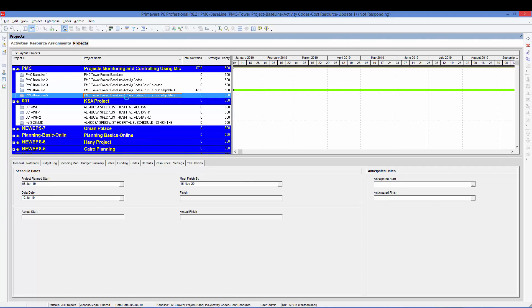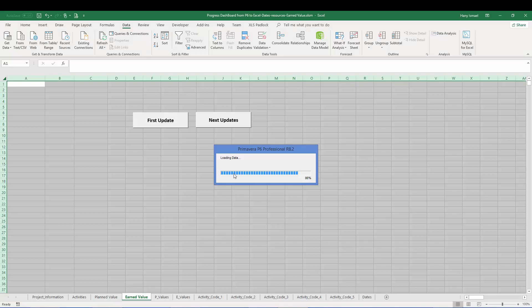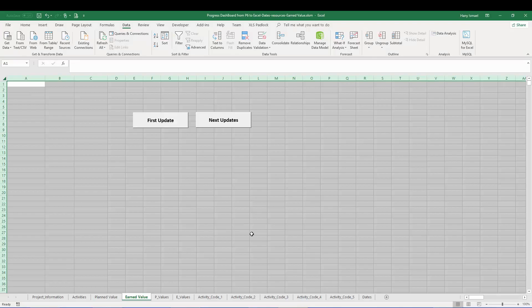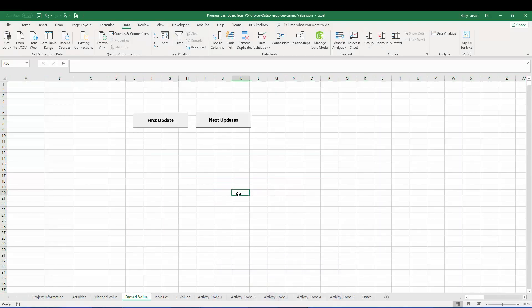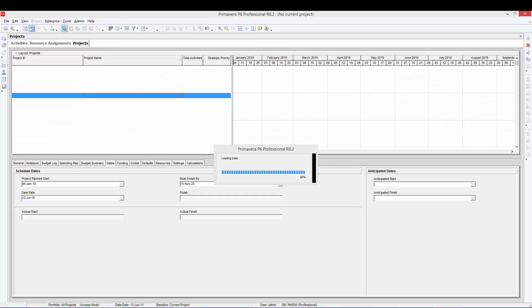And I'm going to copy the data now. But in this time, I'm going to choose the second update or next update here in my Excel, next update. What will happen? The Excel sheet will calculate the earned value for each item and will deduct whatever in the previous and will put in this period or this week the differences between the two. By doing this, I knew this week what was the actual update, what was the actual units, what was the actual earned value. And I'll keep recording it like this. So if you are starting a new project, let's say you are using this course to start monitoring your project now. And you decided to start from whatever latest update you have. So from the latest update you have, consider this one as first update. Then next updates, do it as next update, next update and so on. I'll tell you how to do it.